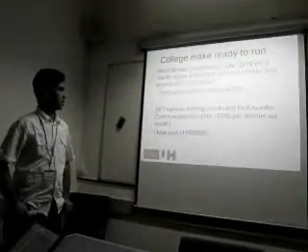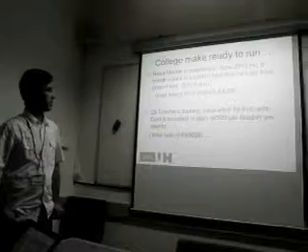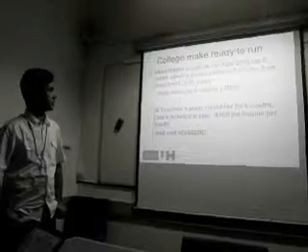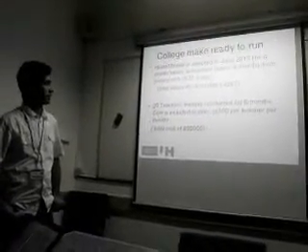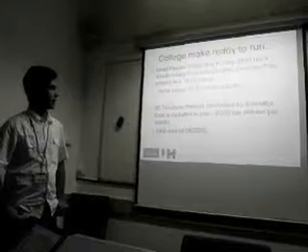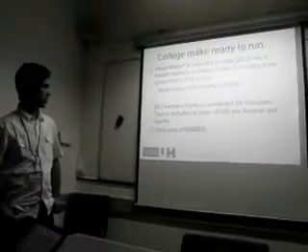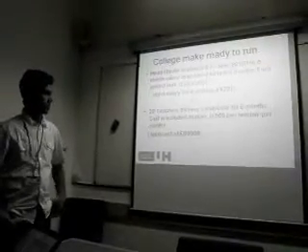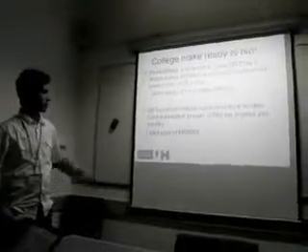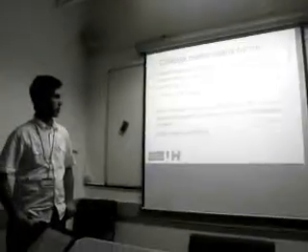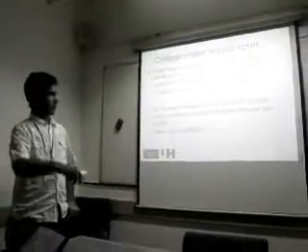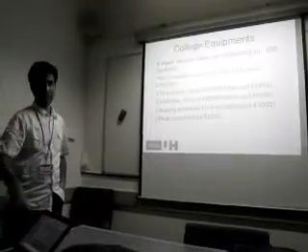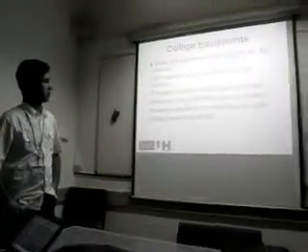And then the college is ready to run, and the headmaster is selected. The headmaster is selected 6 months before the project end, and 35 pounds a day is considered as the salary, so the total salary for 6 months becomes 4,200 pounds. 20 teachers are also trained for a 6 month period, and the total cost for that is 6,000 pounds, 500 per teacher per month. For the college equipment, 4 chairs and 1 table is quite a realistic calculation, so that's 80 pounds.